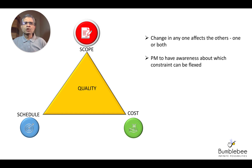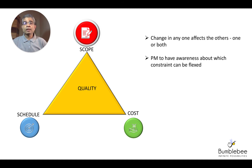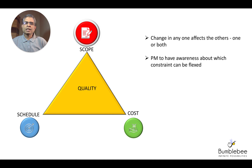The PM also needs to be aware of which of these constraints can be flexed, keeping in view the customer's expectations. For example, if you are working on a deadline-driven project — such as a project linked to a sports event like the Olympics or the football World Cup — you cannot allow the deadline to slip because there is a fixed date by which the software has to be delivered. Similarly, there could be a government project or a non-governmental organization project with a fixed budget based on a grant, in which case the cost becomes the constraining element.